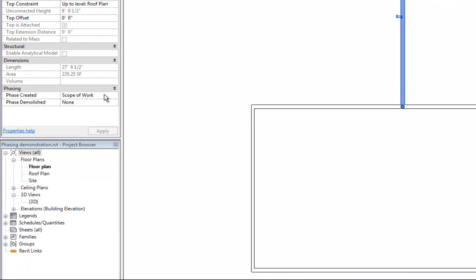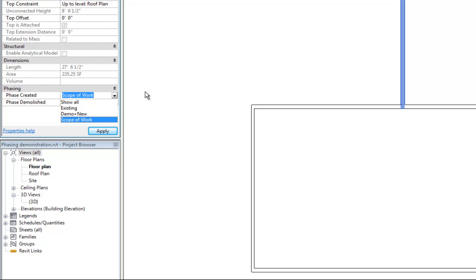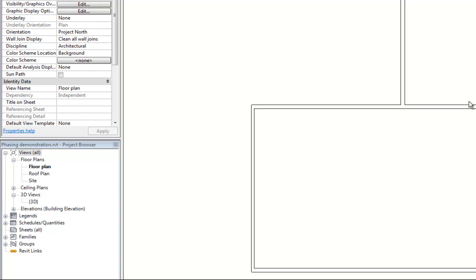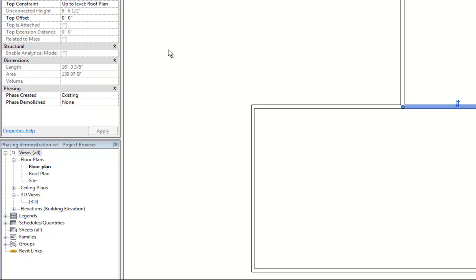The walls for the addition would say 'scope of work' for the phase created because they're part of the scope of work for the contractor, and phase demolished as none because they're not going to be demolished. For a wall that needs to be demolished, I would use phase created 'existing' and phase demolished 'scope of work.' That's why 'scope of work' is easier to name your phase — saying 'demolished in new construction' is contradictory, whereas scope of work can include both building and demolishing.